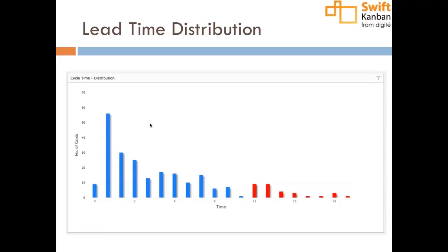Absolutely. In fact, this is actually a great way to highlight these outliers, because some of these will affect your average cycle time calculations very heavily and negatively. And this is one great way to look at what these outliers might be, and at least take them out in terms of your normal prediction and forecasting. But as you rightly said, the idea is to make the band as tight as possible and to keep them to the left of the chart in order to have a greater control on the amount of time it's taking for your team to do any given piece of work.